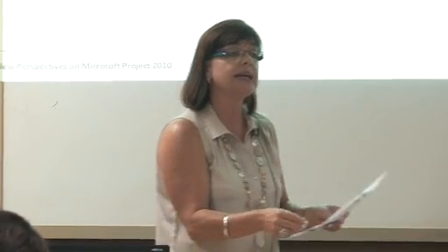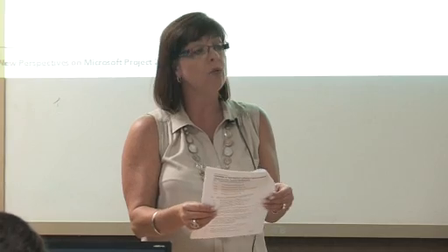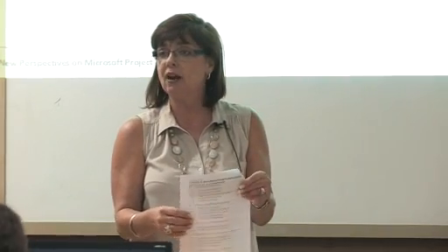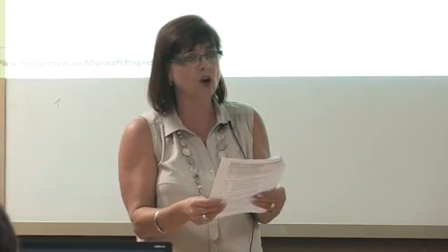We will also look at how we can change the critical path, very important, to actually save us money. Okay? We can change the critical path by doing a few things. We can change the task dependencies. We can add negative lag. That will be explained in the practical session in detail. We can also change the type of dependency. We can change the calendars. Remember last week we changed the weekend calendars or the training calendars and our public holidays and things. And then we can also look at the constraints.